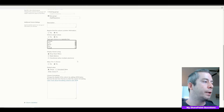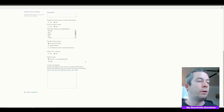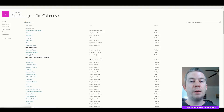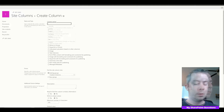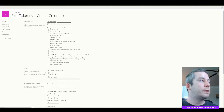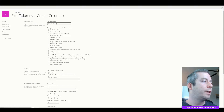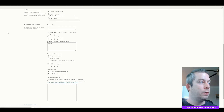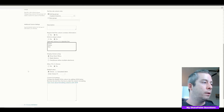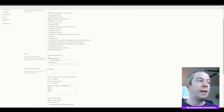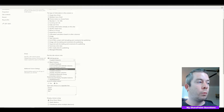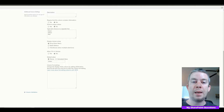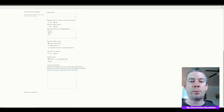We've created one site column. Let's keep going and create Project Status. For our choice field, we'll say Green, Yellow, Red, with a default choice of Green. We'll put it in my SP Questions group — this is for organization, just a best practice. Then we'll also create a Work column as a Number type, also under My SharePoint Questions.